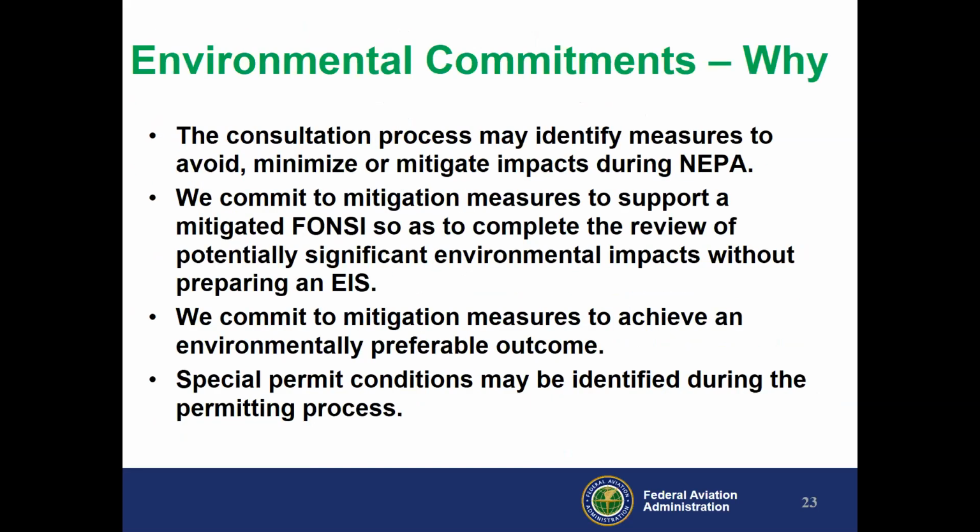So environmental commitments, why do we do this? Well, as we're consulting with agencies, there may be measures that are identified on how to avoid, minimize, or mitigate impacts during that process. And we then commit to those measures to support a mitigated FONSI so as to complete the review of a potentially significant environmental impact without preparing the EIS.